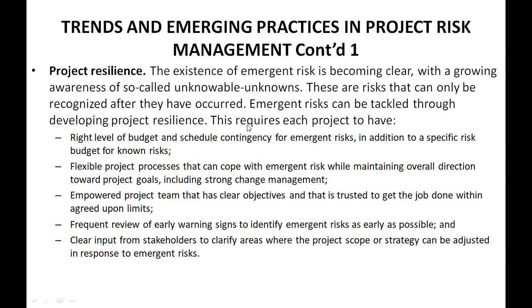Okay. Now we also have project resilience. Project resilience is the ability of the project to keep on course, irrespective of whatever challenges may occur. The existence of emergent risk is becoming clear, with a growing awareness of so-called unknowable unknowns. These are risks that can only be recognized after they have occurred. Emergent risk can be tackled through developing project resilience.